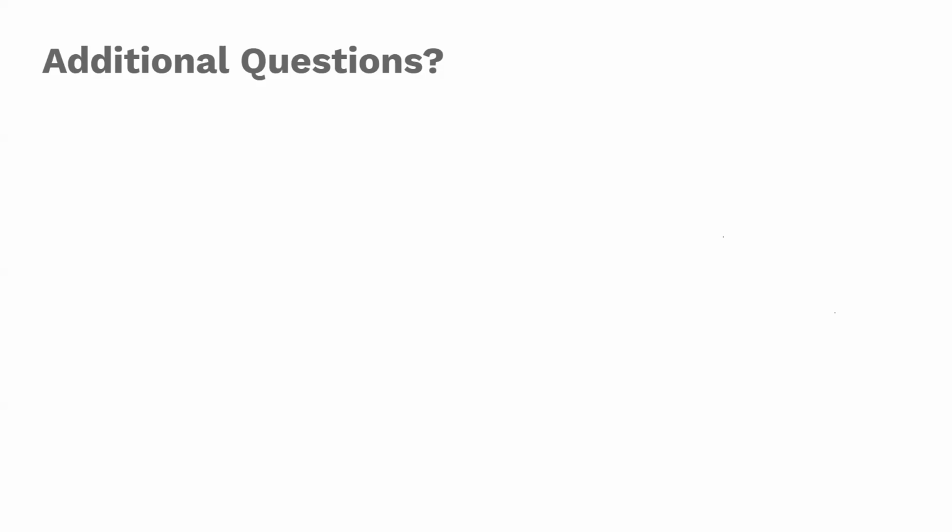Because if you're starting to change major things in the field, you really need to be coordinating with all of the trades who are impacted by those changes so that there aren't issues, especially if details need to be revised and things like that.